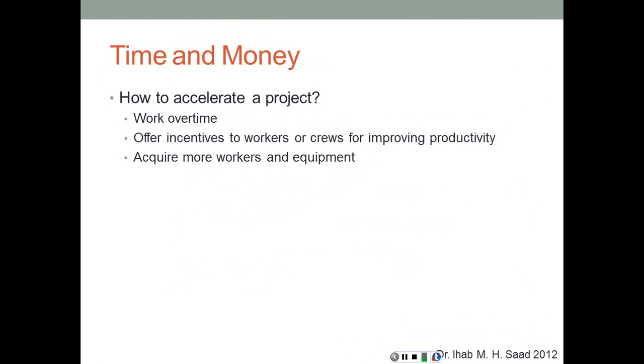We can also work overtime or an additional shift. We can offer incentives to workers or crews for improving productivity. And we can acquire more workers and equipment, basically adding more resources, which is going to be quite costly.